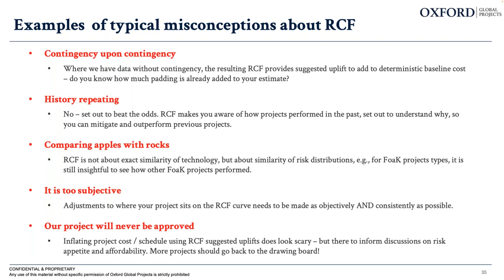Another one we often hear is, this is then just history repeating. I mean, we don't really want to apply this uplift to then just perform as badly as previous projects, which is a fair point, and fully agree. We set out to beat the odds. RCF makes you aware of how projects performed in the past, and then we need to look into understanding why that is, so that you can inform your risk mitigation strategy and increase your chances of outperforming the previous projects that are in your reference class.